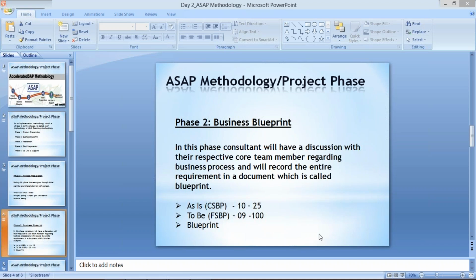One more thing I would like to add here, guys. Whenever you go for an interview, people will ask which version of the blueprint we send to the client for sign off, for signature purposes. So I'll tell you, when you send your blueprint the first time, the client rejects it saying that these changes are required. Whatever blueprint we sent initially and that got rejected is called the draft version. Whichever blueprints get rejected are called draft versions.